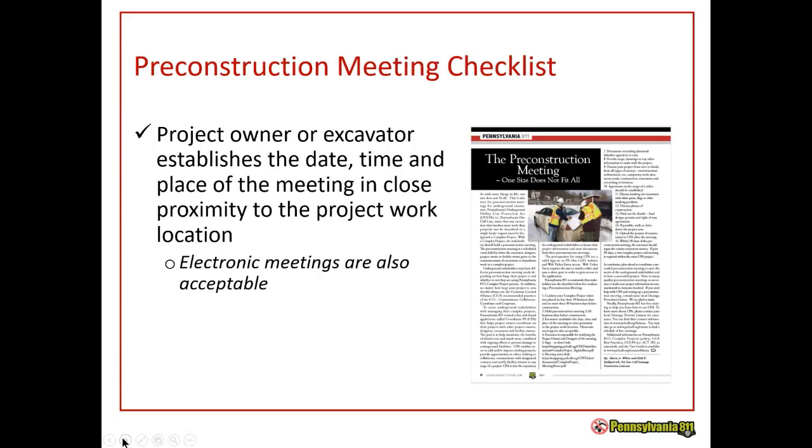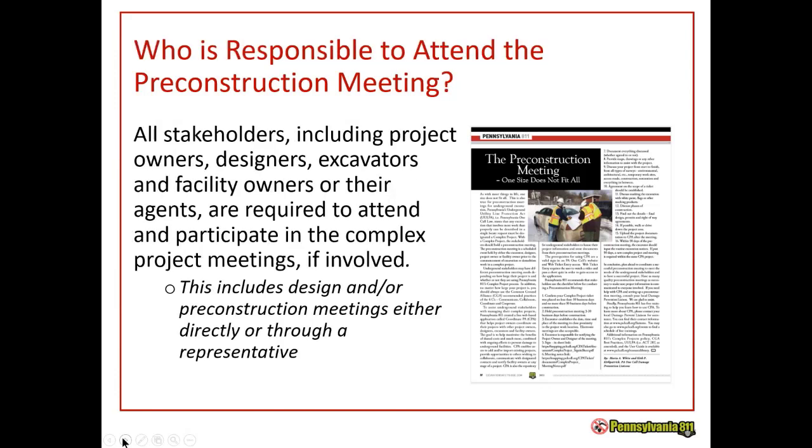So the project owner or excavator establishes the date, time, and place of the meeting. And you can also do electronic meetings. I know we're still doing a lot of that. And then you'll want to make sure you invite all of the stakeholder groups: project owners, designers, excavators, and facility owners. And then sometimes their agents will come instead, like you might have a locating company contractor show up for one of the facility owners.